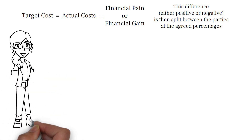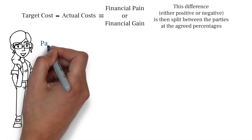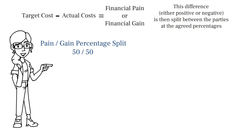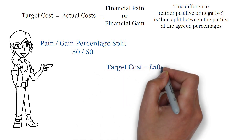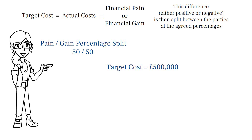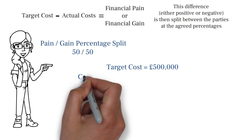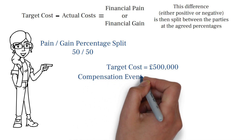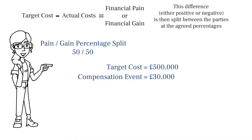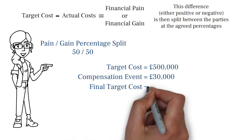Let us work through a practical example together. For this example, we are going to assume that the percentage split between the client and contractor for any financial pain or gain is 50-50. We are going to imagine that a construction project has been tendered for and the target cost has been agreed at £500,000. During construction, it was found that the ground conditions were not as stated in the design documents and concrete was discovered. The additional cost incurred to remove the concrete and make the ground good was £30,000, and this was submitted for and agreed through a compensation event, raising the target cost to £530,000.